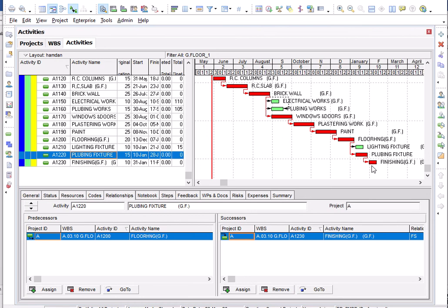This is completed, but we saw this before, these floats. We must bind every activity from the start and finish. If we leave it free from finish, it will run up to the end of the project time. If we leave it free from the start, it will come to the start, so you have to bind these things.